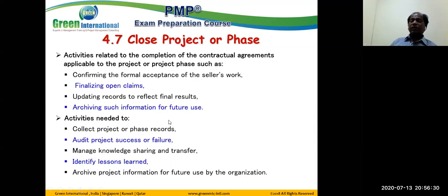The other activity is contractual closure, which is contract closure, where we are thinking about confirming the final acceptance of the seller's work, finalizing the open claims, updating the records to reflect the final results, and archiving the final information for future use.